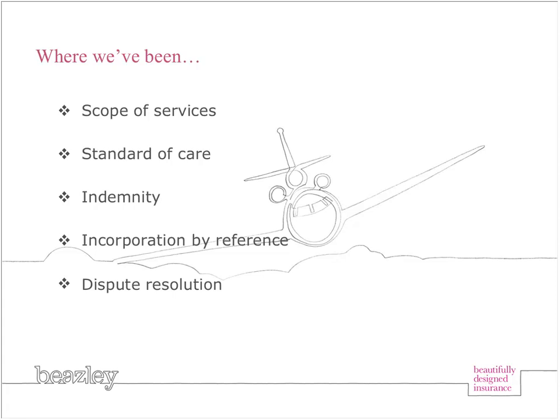And then lastly, dispute resolution we chatted about last time. We recommend that your disputes be submitted to non-binding mediation as a condition precedent to litigation as the binding dispute resolution mechanism. And clients sometimes like to use arbitration. We at Beazley have found in an examination of our claims over the years that litigation can and does produce more favorable results. Some of the inherent downsides to arbitration are that it is binding.